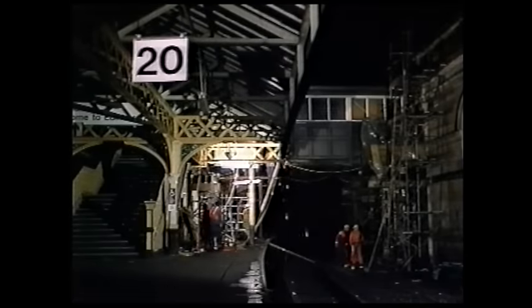The twin Calton tunnels that lead into Edinburgh station also underwent major reconstruction. There was extensive relining using precast concrete sections. Over 1,000 securing bolts were driven into the surrounding rock to give it greater strength. The running lines in each tunnel were singled to give greater clearance for the wires.